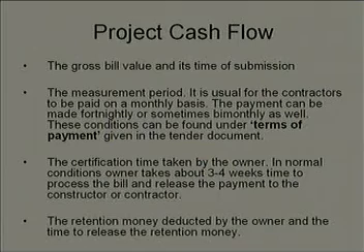In most of the projects, especially when the client is from the private sector, you will find that there is a provision of mobilization advance. Normally, mobilization advance is about 5 to 10% of the total contract value, right.